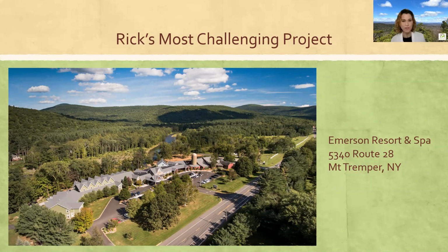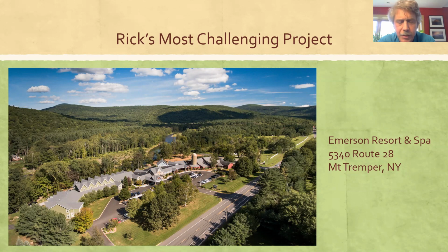And don't forget the giant kaleidoscope is there. Yeah, well, that was in and of itself a unique thing. That was in the 90s. There used to be a different building code, but the building inspector at the time said the building wasn't sprinklered. It is now. But at the time, the building inspector said you can't have a 3-story building that's not sprinklered. And somehow I explained to him through the code that even though it was 50 feet tall, it was still only a 1-story building. Now it's concrete, it's not going to burn anyway, but he granted the building permit so that they could have the kaleidoscope.